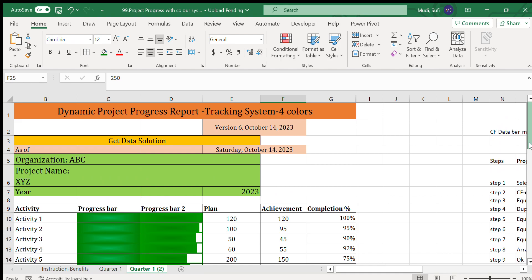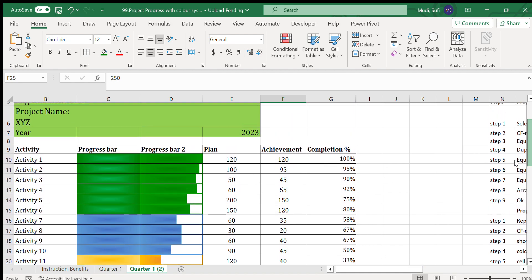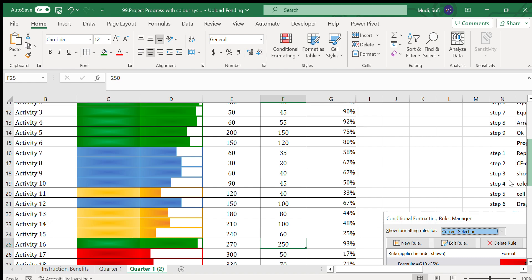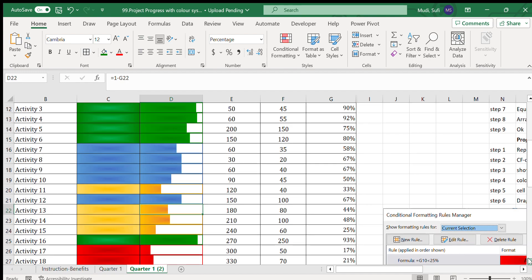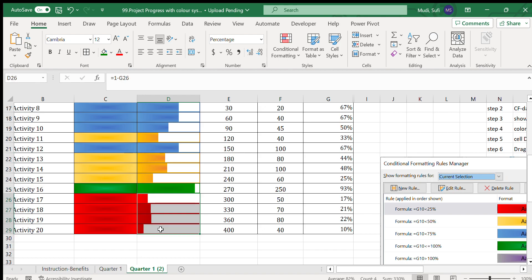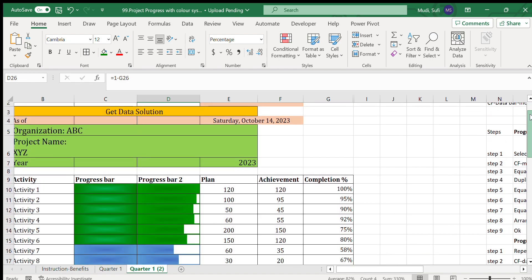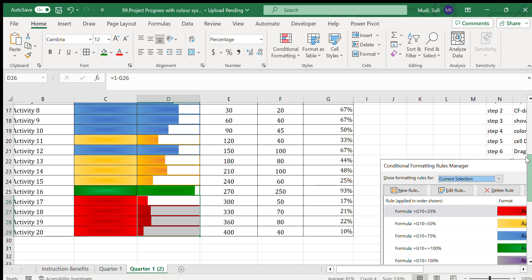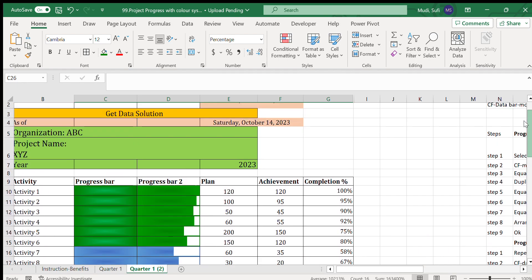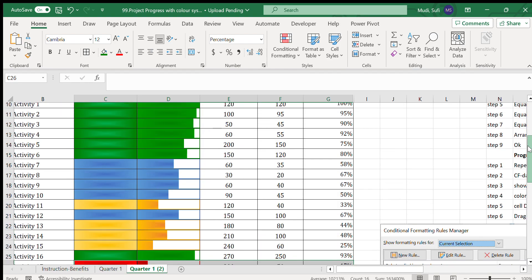We can easily see the progress of our project. Green shows the best-performing activities, blue is the next category, then orange, and red indicates underperformance needing attention. For example, activities 17 to 20 need managerial or project team attention in the next quarter. This is very helpful to show project progress.